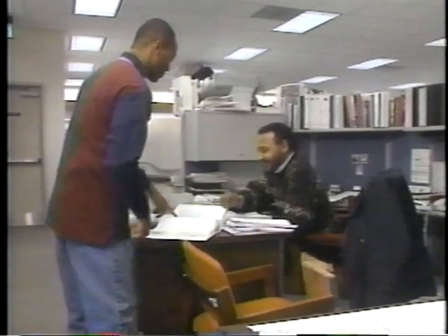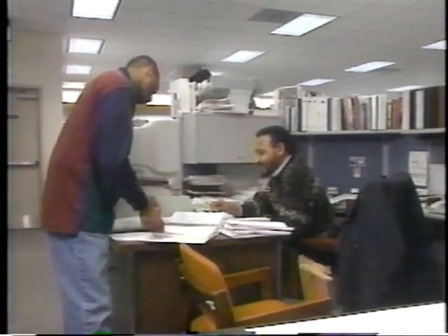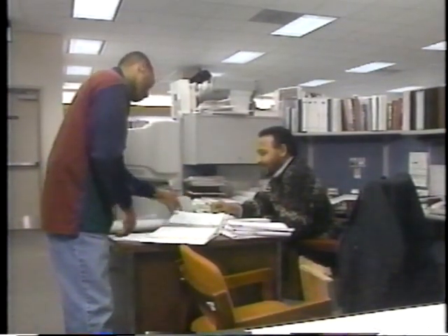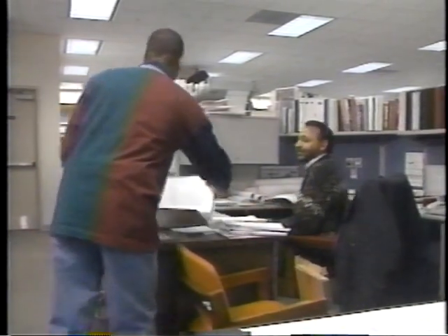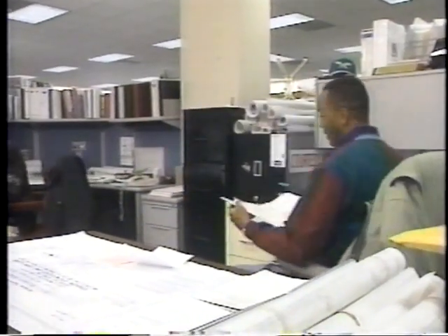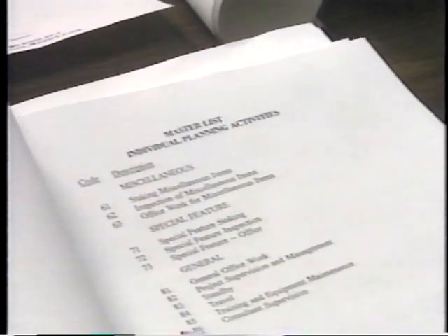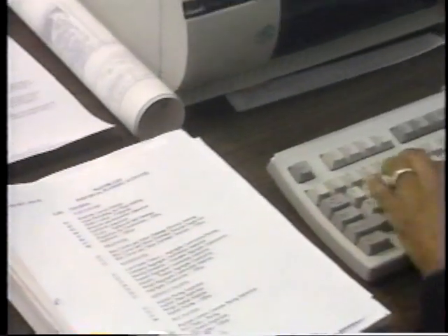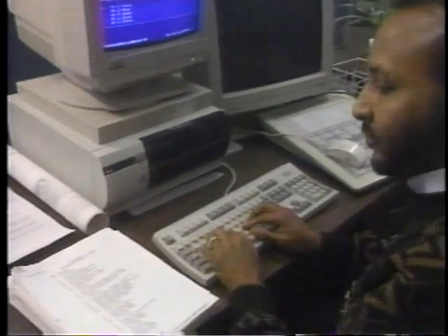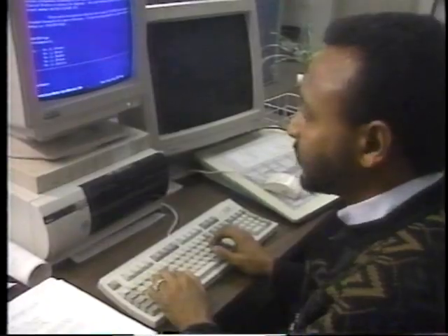However, 80% of the total man-hours used in those agencies were on about 35 activities. The remaining 20% can be combined in miscellaneous activities. A master list of typical activities has been compiled. It is intended to cover the significant activities for most agencies. Each agency should modify this list to fit its own work methods.